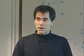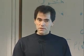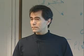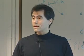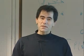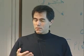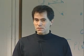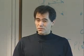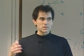And it's not based on taking a look at all the design drawings and saying, okay, this costs this much from the vendor, this costs this much, and you put it all together. That's called a bottoms-up assessment, and it's more accurate, but it also relies on having an accurate design picture, which obviously you don't have early on in a program. So it's almost like a black art to try and take a requirement set and craft a design early on, or at least bound the design and bound the cost. Because again, early on what you're trying to do is get into the cost envelope and still meet the scientific objectives that you're trying to do.